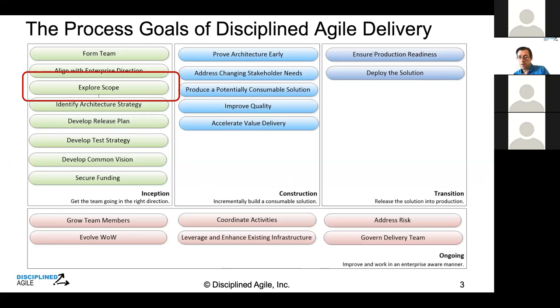And that could be business work. It doesn't have to be just technical work as well. It's a communication mechanism. Make sure stuff doesn't get dropped. Otherwise, if we don't put it into the work item list, we often find it either doesn't get done, or our estimates or sizing are wrong because we didn't know this work was being done. So transparency is a good thing.